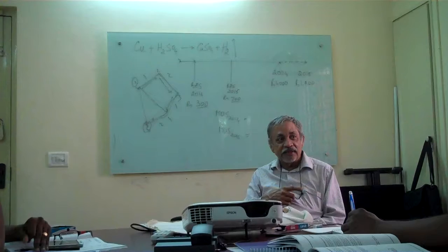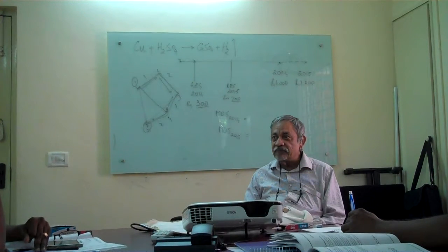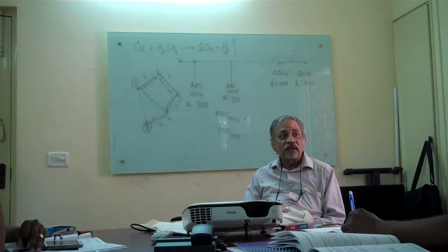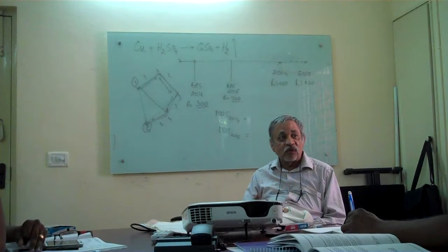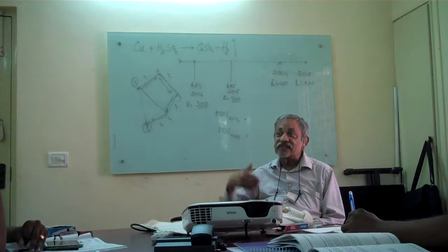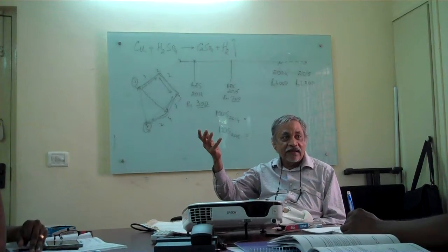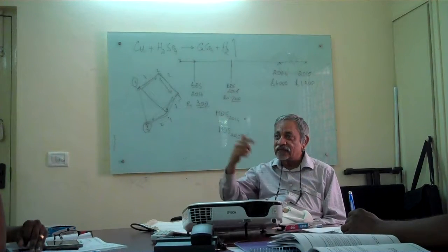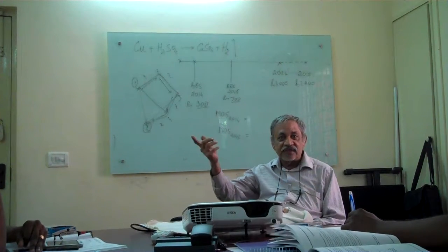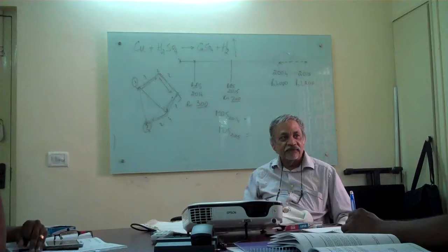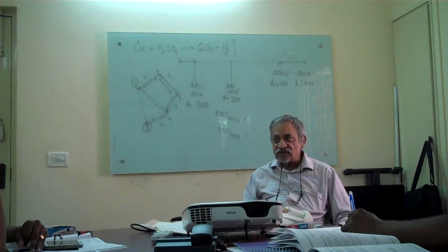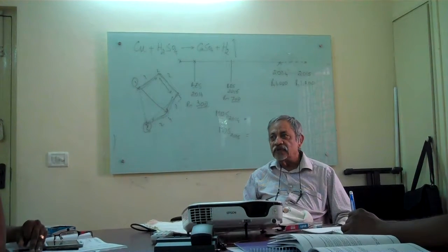The tunnel is being done. Simultaneously, the bridge is already being built and made elsewhere on some other site. And by the time the tunnel is ready, the bridge is ready, and the bridge is brought overnight and fixed. That is a magic box system. This is one example of PERT.